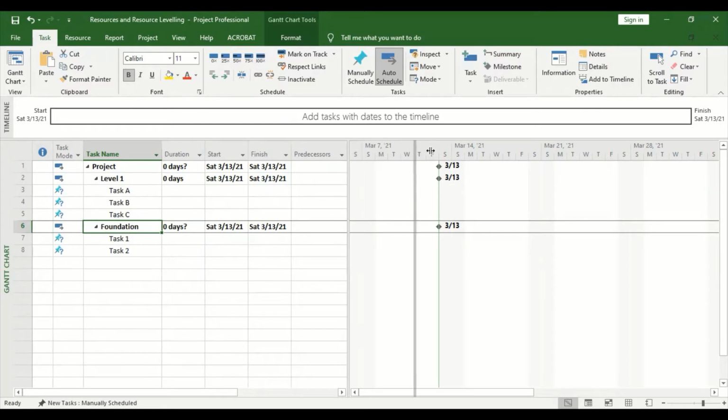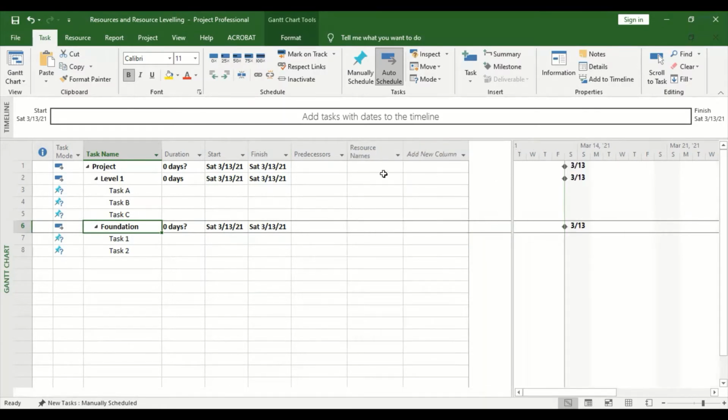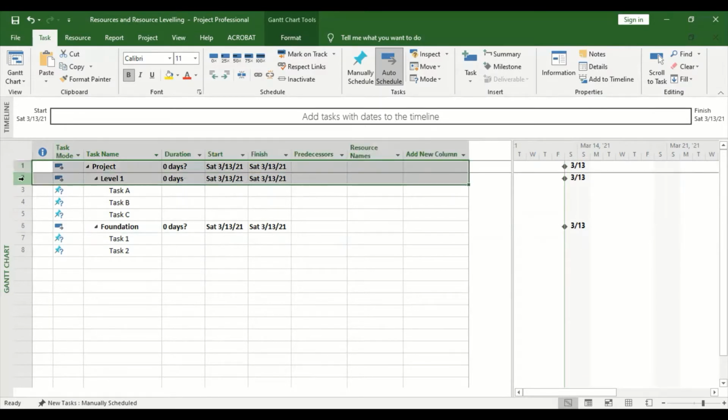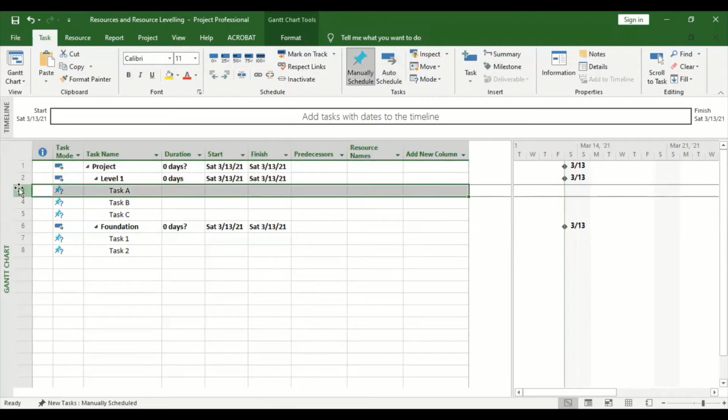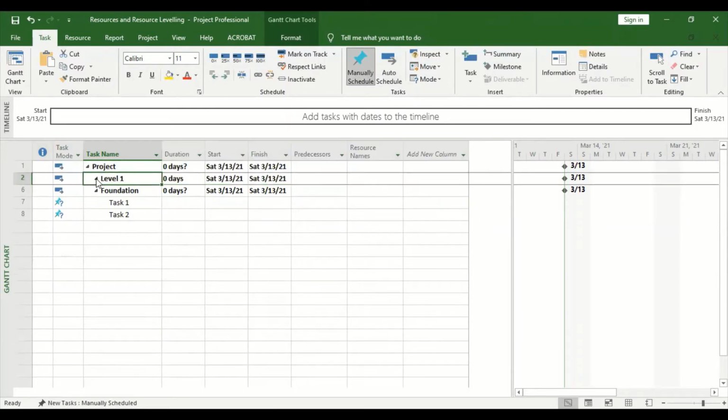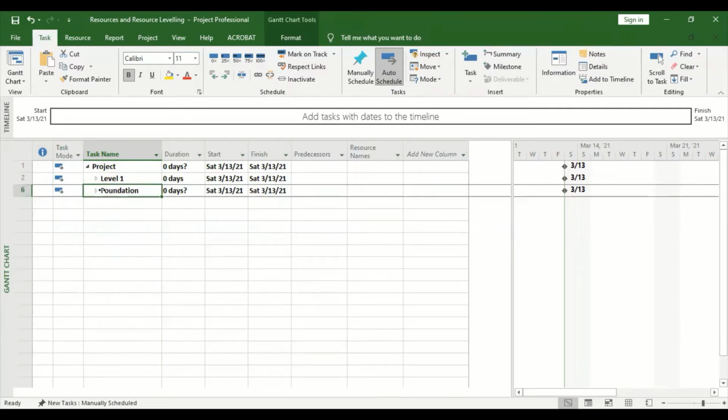Now here you can give different durations, but today our concentration is on resources. So when you assign resources, you don't assign to levels because these are kind of like levels of the project. They are not the real tasks. It's only the tasks that consume resources. So these are the tasks now. These ones are not, because here, okay, I can call this maybe level.